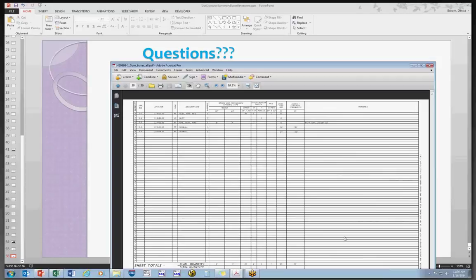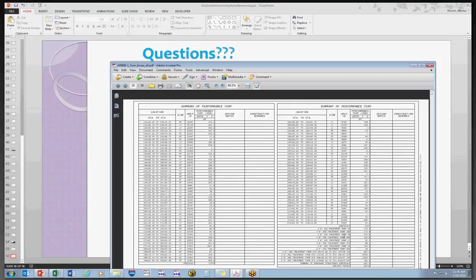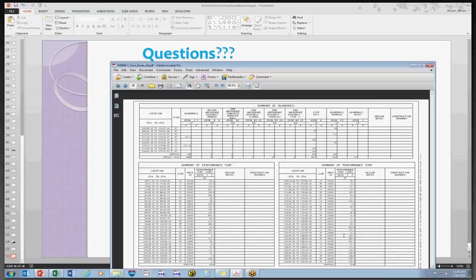Turf was fine. The only thing I would question on the performance turf is the preference would just be the performance turf alone, and the sod should only be where it's required in the PPM or shown, like with the design standards around the drainage inlets. And I'm not sure if this is the example that had a consistent width of just a roll down the side, but this one isn't. Otherwise it should be using the performance turf, the -1 item, as their primary item, and only using sod where required.